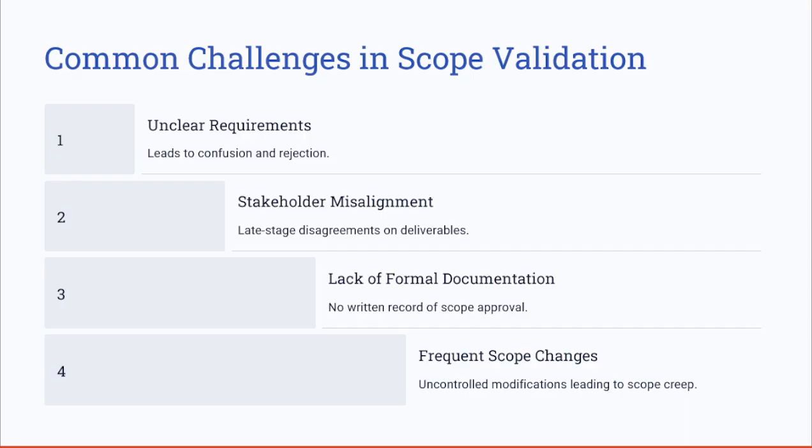And to avoid scope creep, or uncontrolled scope changes that impact the cost and resources before implementation, ensure that any requested change goes through a formal change control process, where you have to understand the change, assess the impact on you, the team, and the project constraints, and then raise it to the change control board, which is the CCB, and then take the approval. Based on that, you need to update all of the project plans to accommodate these changes and their impact on the constraints.